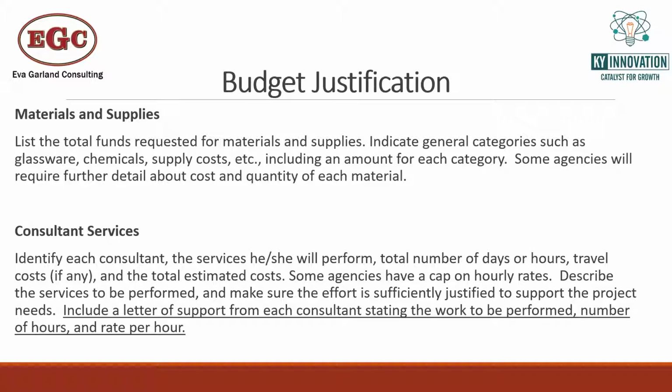You want to make sure, as with the other personnel, that any effort, any numbers you put in there are justified. So if the consultant is putting in 80 hours, make sure you have a very specific scope of work that would reasonably take 80 hours or so to complete. Make sure you include a letter of support from the consultant stating the work to be performed, the number of hours, and a rate per hour.